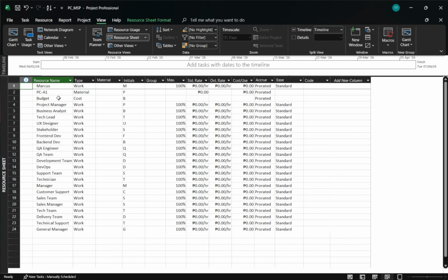Resource information, availability, cost, and calendars are stored centrally, so updates are consistent everywhere. Remember to save both the pool and the project when you're done, and keep the pool file accessible to anyone who needs to schedule with these shared resources.